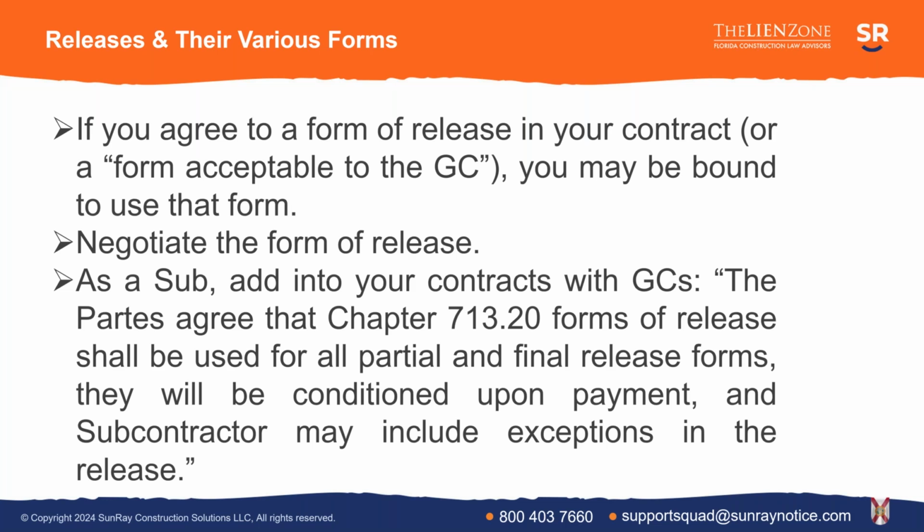They will be conditioned upon payment, and subcontractor may include exceptions in the release. So if you added something like this to your contract, it now gives you a contract right to say, hey, we agreed that we're going to use the statutory forms. That's the first part. We agreed that I can make each release conditioned on actually being paid. That's important. We're going to talk about that in a minute. And we've agreed that I can include exceptions in the release.